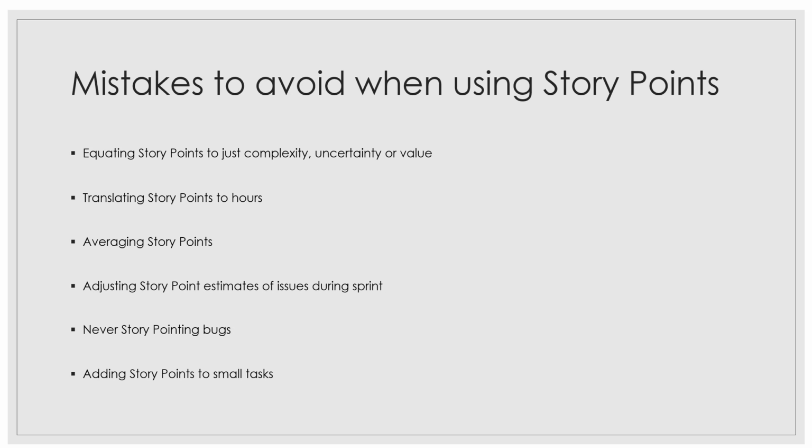You should not do this, as it once again attempts to provide a false sense of accuracy. Whenever we are doing story point estimation, the point is not to be 100% accurate. The point is to be accurate enough to plan ahead of time and to foresee the challenges that might come ahead of time. But it's not to be 100% accurate. So never ever average the story points. Initiate a discussion. Try to find out why certain people rate it as 3 and why others rate it as 5. Try to bring the team to a level where they can all reach a consensus.